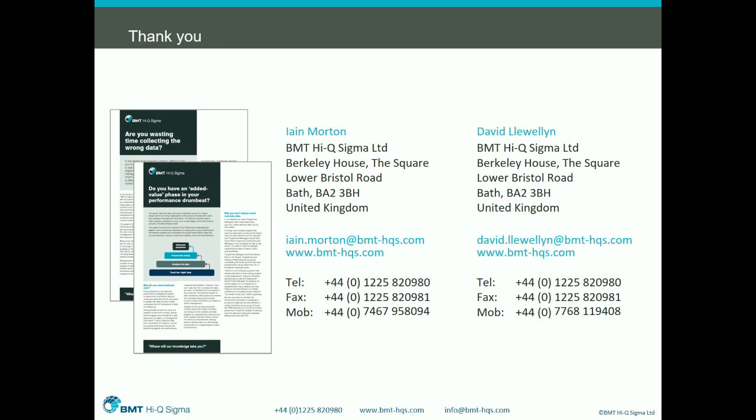Yeah, I think the only thing I would say with that is just also ensuring that you've got a status date that the entire program works to, and the data stays the same as it goes through the performance reviews. It's just the differing form of analysis that happens as you go through the hierarchy. If you've got that clear structure in place, then everybody should know what they are doing as you go through the life cycle. Yeah, thank you.